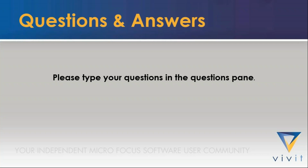So yeah, true. SM was quite heavily customized, and we had to take, in some instances, a hard line to say, let's apply governance rules, because some of the customization went against what governance really asked for. In instances where we could cater for the customization outside of the tool, like a reporting requirement or an integration requirement, we would do that outside the tool and bring all of that back into the tool. We handled the very complex customizations, such as business rules that were not out of the box in SMAX, outside. Things like integration for underlying applications we also handled outside of the tool. That helped to augment what the SMAX capabilities provided.